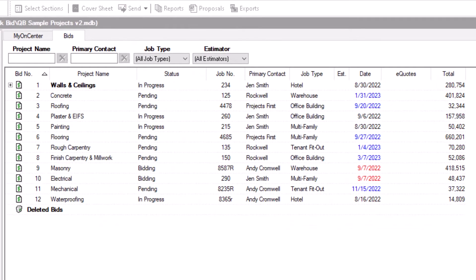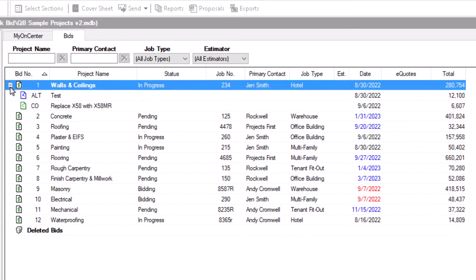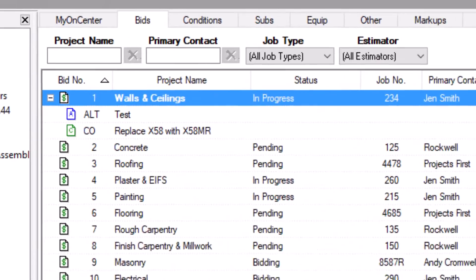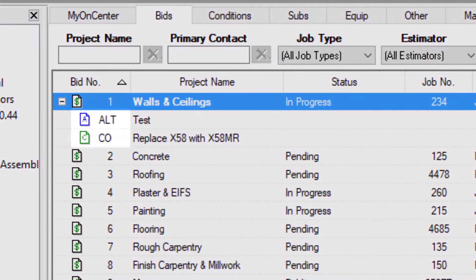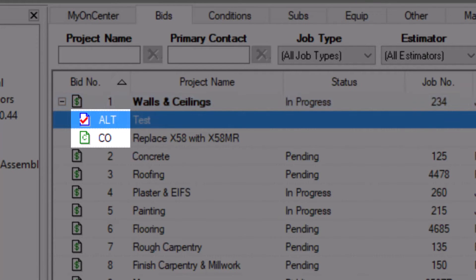Some bids may display in bold with an expand button on the far left. These bids contain an alternate or change order. Expanding the bid shows the child bid within. Pending change orders have a green C sheet icon, and alternates have a blue A sheet icon. Once accepted, the icons change to include a red checkmark.